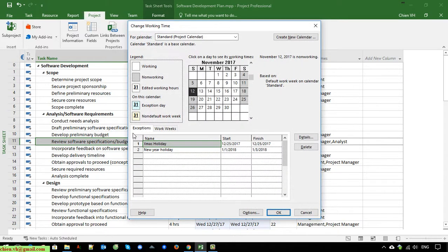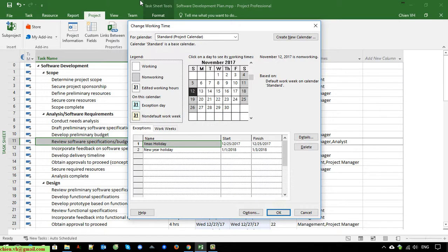I think that's all for today. After you finish this video, you know how to add the holiday into your project timeline. After you add the holiday into your project timeline, the finish or end date of your project will be increased. Hope that helped, and let me know if you see any issue. Bye bye, see you later.